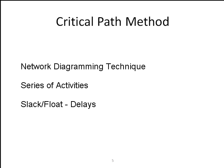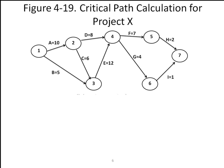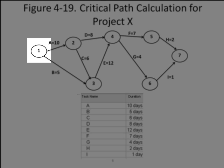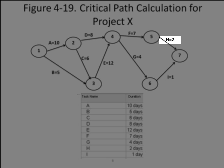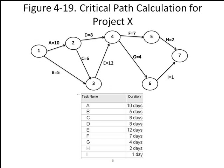Let's look at this same data as was shown in the Gantt chart previously, using the critical path method. Here is the critical path for a particular project. The circles are called nodes and are simply the starting or end points and activity junctions. Here's the associated Gantt chart listing the activities A through I. From the starting point of the project, node 1, there are two activities whose durations are 10 and 5 days respectively. Each activity is listed in the critical path method with the added information of dependencies. Activity H depends on activity F's completion; activity F depends on activity D's completion; and activity D depends on activity A's completion.